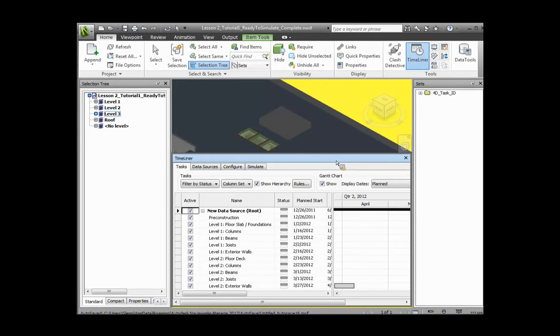Again, you can get into this at an incredible amount of detail if you want to, but do it at the high level first and really get your head around it before you go down. You don't really need to think about things minute by minute. You might need to do that if you're simulating a very small construction operation and trying to understand it in great detail. But at a high level, activities that are 2 or 3 days at a time are a good chunk size. Think about the chunks that make the most sense to you.